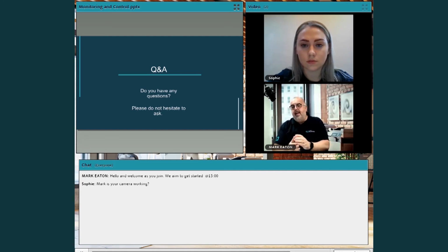You can flex scope. This is a big thing in the agile world. If you run your projects in an agile way, they fix time and cost, but flex scope. So you can choose what you're going to deliver, what's going to be the most value to you.